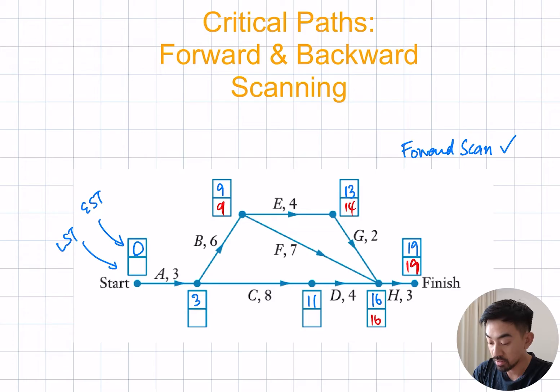Moving my way down here, 16 minus 4 is 12. Now I have a clash again. 9 minus 6 is 3, and 12 minus 8 is 4. So obviously that will be 3. And then lastly 3 minus 3 is 0. Okay, so that is done.